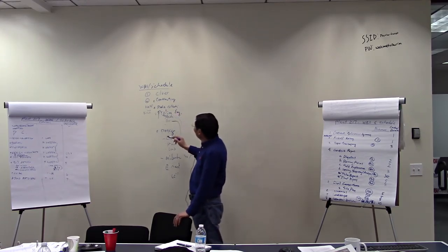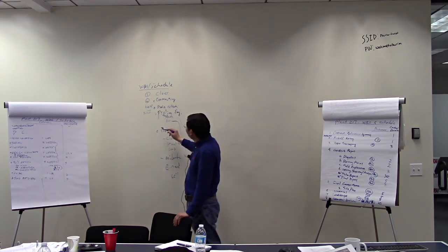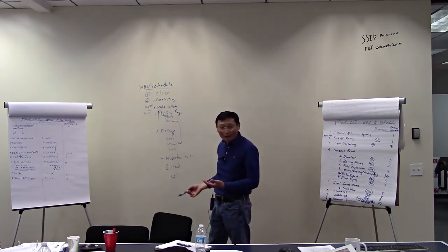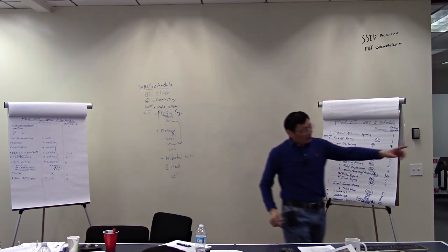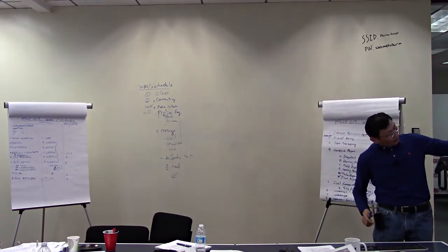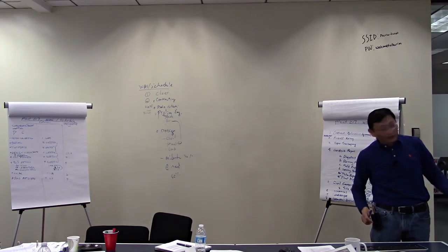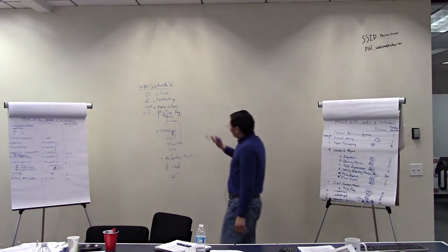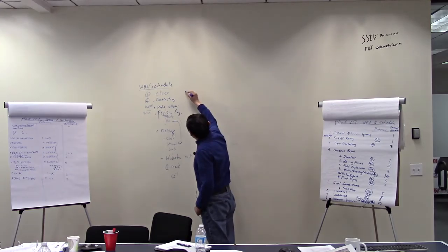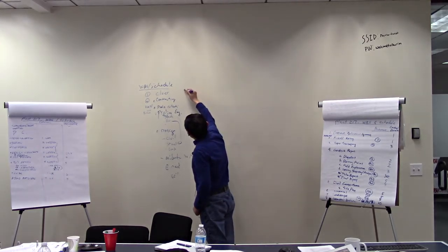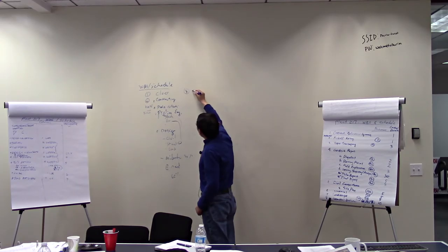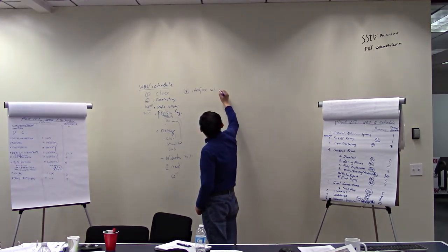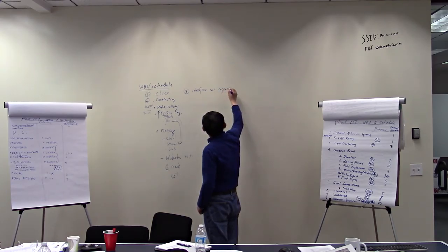Okay? You can't really do the structure without, for example, geotech in place. Now you identify the relationship. You can't really do the civil design without the topo in place. That's natural. Okay, you can't do the kickoff without contracting, for example, however that is. So this is how it is chunked off, and underneath you identify whatever that is.